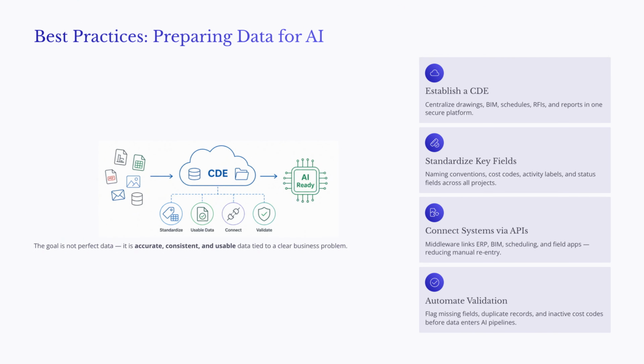The first best practice is to establish a common data environment, or CDE. A CDE is a secure platform where drawings, BIM models, schedules, RFIs, submittals, field reports, issues, and communications can be stored and managed. A CDE helps create a single source of truth and reduces the risk of version conflicts.